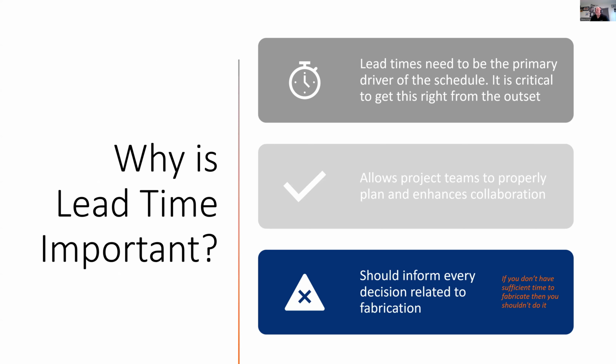But it really has to be thought of in terms of how much time do we have to manufacture and how much time does it take the shop to do this in a way that makes sense where they're not just always jumping through hoops. So understanding that lead time is important and it really should be considered in the schedule for fabrication. It allows our project teams to plan accordingly.